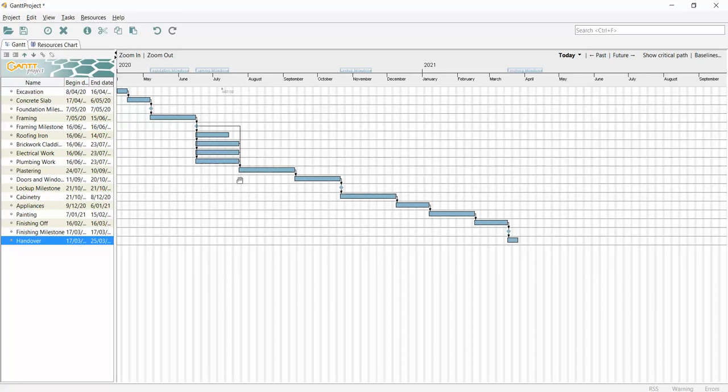Here are concurrent tasks. So these are tasks that are able to carry out at the same time. All the rest are sequential. One follows the other, which follows the other, and so on. So this is a Gantt chart. This is how to represent a predecessor table and project tasks in a graphical way.